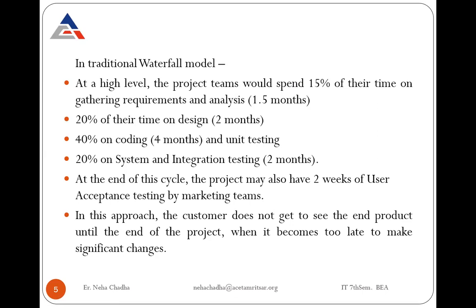Then 40% on coding, that is 4 months, including unit testing. 20% on system and integration testing, approximately 2 months. At the end of the cycle, the project may also have 2 weeks of user acceptance testing by the marketing team.